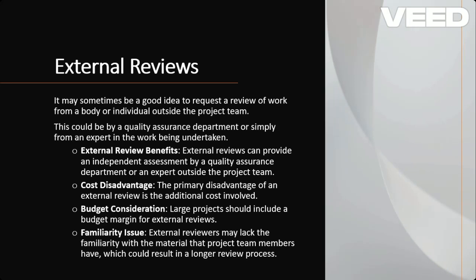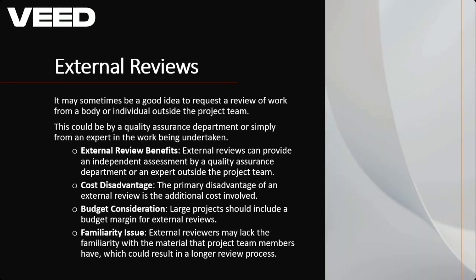So external reviews come in, where somebody external to the project is invited to check the review or the products that have been produced by the project. This can be a quality assurance department or a consultant who can be brought in from outside based on their experience and their record. Then they come and review the work.